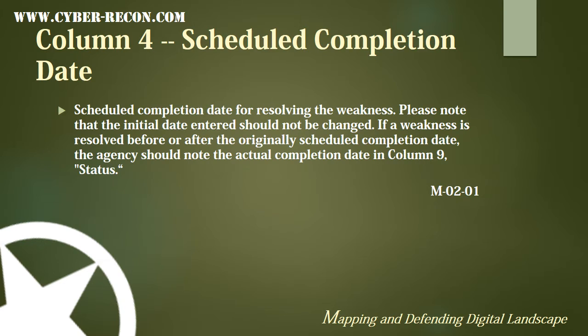Column 4 is the scheduled completion date — the scheduled completion date for resolving the weakness. Please note that the initial date entered should not be changed. If a weakness is resolved before or after the originally scheduled completion date, the agency should note the actual completion date in column 9, which is status. As noted earlier, this was not called out as one of the locked columns in OMB M-02-01, but in this instruction it's indicated that this should not be changed once entered.